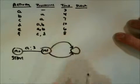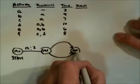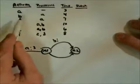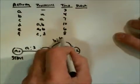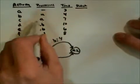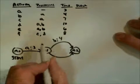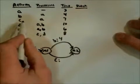This will be Milestone number 2. B is going to come out of A. And the time for B is 4. C also comes out of the Milestone that A goes into. The time for C is 7.